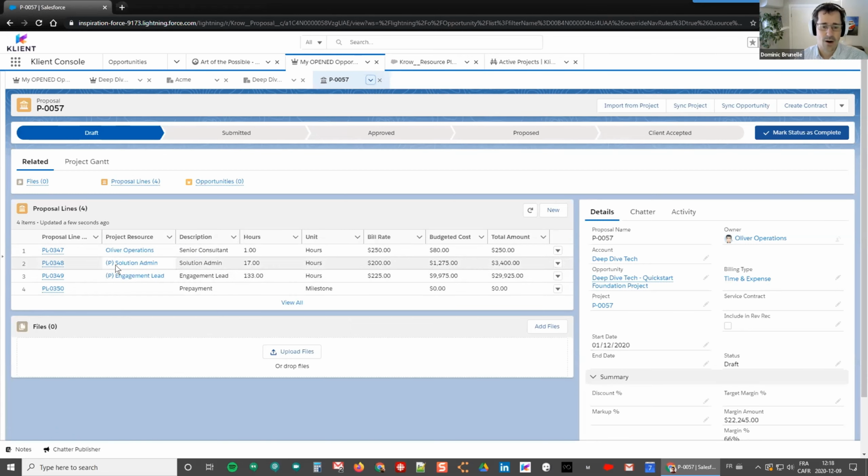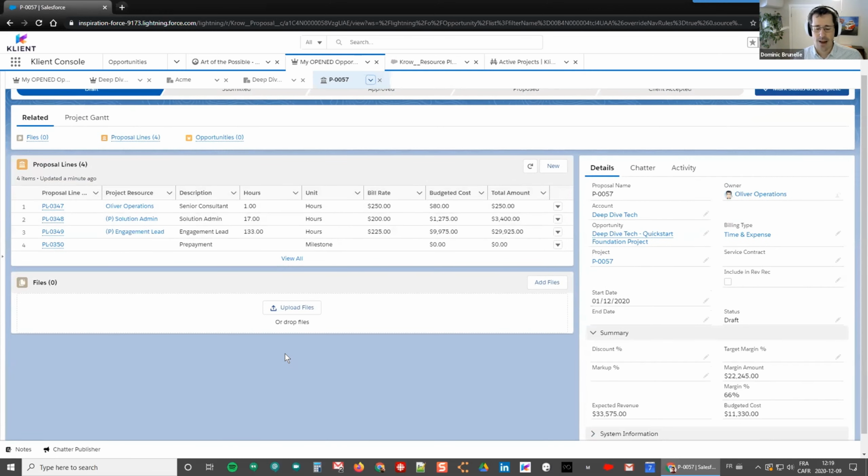So we have a total number of hours for each of those resources, and we could even have different resources that would play different roles in the project, and that would be considered. Then that will consider the project rate cards and all the rates that will be assigned to each of those project assignments. So that got brought over. So quickly, if there's nothing else to do, we have a price there. If it's really just a bucket of hours based on a standard process or standard products we're quoting from, then we already have our quote. In a sense, we have our expected revenue, we have a detail of what it comprises, and then we could be good to go.